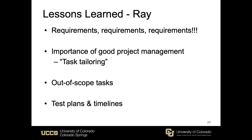I grossly underestimated the importance of project management before this semester, but now I'm convinced that a talented and motivated project manager is worth their weight in gold. This was one of my jobs for BoozeStack, but I was neither farsighted nor proactive enough to do it well — if it wasn't for the motivation of my teammates, we would not have completed BoozeStack this semester. The project also emphasized what I call task tailoring: knowing your team not only by their skill sets but also their skill levels. If someone is a beginner at soldering it's critical to explain each step in detail and allow extra time, compared to an expert whose instructions might simply be to finish a PCB using surface-mount parts. A few times I expected more out of teammates than their skill level could realistically accomplish, and these miscues cost us time and sometimes hurt feelings.